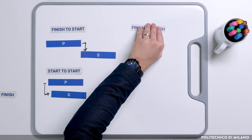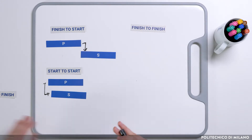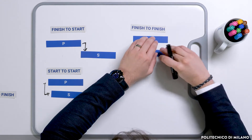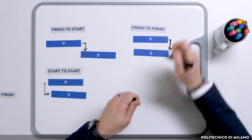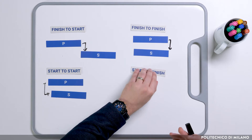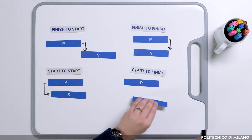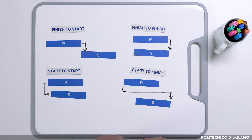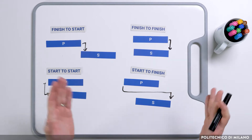Finish to finish: the predecessor must finish before the successor can finish. For example, laying asphalt must be completed before line painting can be completed. And finally, start to finish: the predecessor must start before the successor can finish. For example, road excavating must start before line painting can be completed.